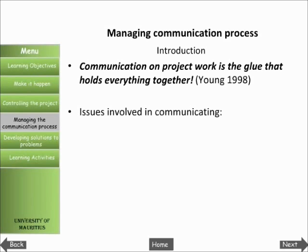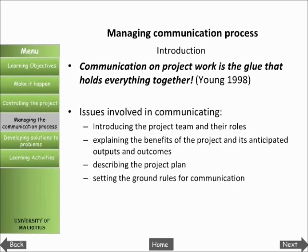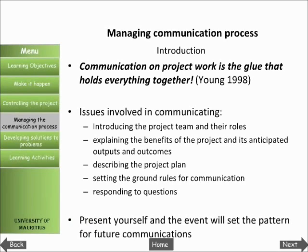Some of the issues involved in communicating with all people involved with a project, starting from its launch, are as follows: introducing the project team and their roles; explaining the benefits of the project and its anticipated outputs and outcomes; describing the project plan; setting the ground rules for communication; and responding to questions. Launching the project also allows you to set the tone of communications. You may arrange to be formal or informal, accessible or distant. However you present yourself and the event will set the pattern for future communications.